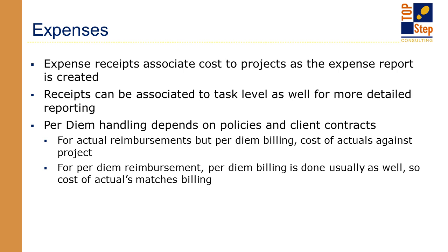Okay, expenses. Expenses can be used to generate travel expenses associated to projects. And as the expense receipts are created in OpenAir, the cost goes against the project immediately. They do not have to be approved in order to report on them. Receipts can be associated at the task level for more detail in reporting.